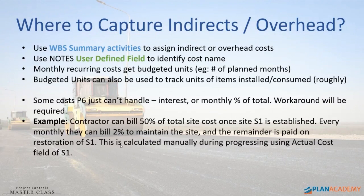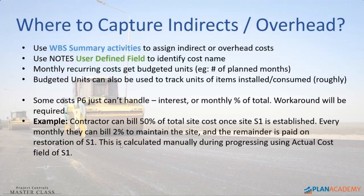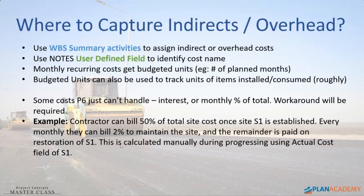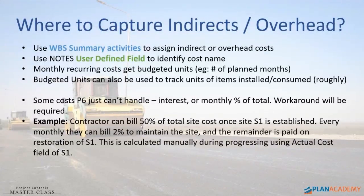In my project, the contractor for establishing site S1 — basically clearing the ground and putting up barriers — they can bill 50% of the total cost once it's established. But because they have to maintain that site throughout the duration of the project, the rules say they can bill 2% of the cost every month until the end of the project, where they restore the site and bill whatever was left. P6 is not going to model that at all. What we did is we could status it with 50%, and then increment the status 2% every month for actuals — but we couldn't model it in terms of planned work; it's just too hard.